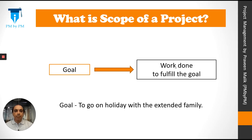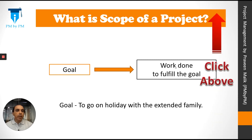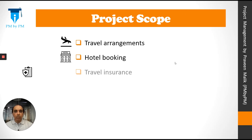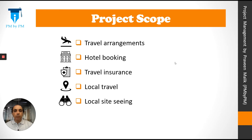Do you remember our example project from the knowledge area video? Our goal was to go on a holiday with the extended family — you can click on the card above to look at the earlier video. So what kind of work will we do to fulfill this goal? A project scope could include five pieces of work: travel arrangement, hotel booking, travel insurance, local travel, and local sightseeing.